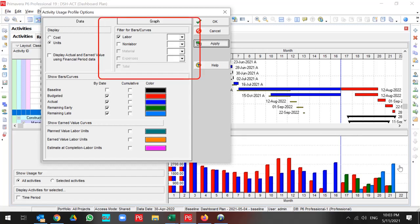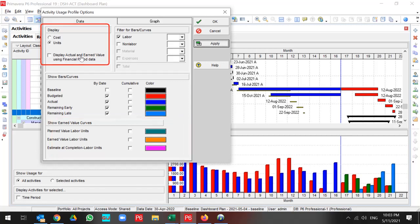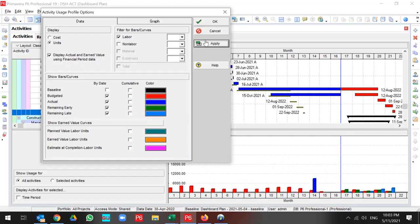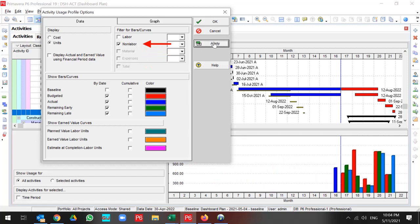You can select your labor, non-labor, material and expenses in Activity Usage Profile. Also, you can display actual and earned value using financial period data. If you store your data based on financial period, you can use it. But if you don't want to use it, you can use the P6 curve. Also, you can change from labor to non-labor. This is my information for my non-labor resources, and this is my information about labor resources.